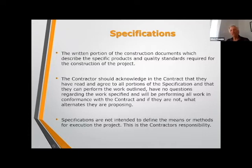They all go together. For example, I was just talking to somebody yesterday and somebody's giving them a proposal to do a waterproofing on a basement. So I said, well, what's the warranty? So he says, well, the contractor told me this is the warranty. So I said, well, the thing you have to do is get what the warranty is in writing, and it has to be attached to the contract, so it's part of the contract. So they all work together. They have to be connected.